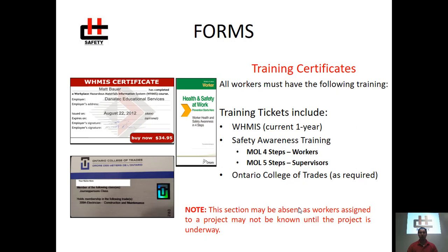It's also important to know that additional training tickets may be needed for task-specific activities. For example, if anyone is doing any kind of working at heights activities, working off of a lift, or 10 feet in the air, they must also have working at heights.